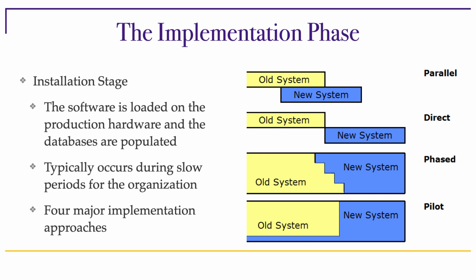And so the way you decide which units to pilot on is also interesting. You may choose a really high-performing unit to ensure that there are no major problems. Then you could look at a low-performing unit, one where you expect to see the most problems, just so that you can preview how to fix them. And then once you have this sort of information about what happens during installation, you can roll out confidently to all the other units.